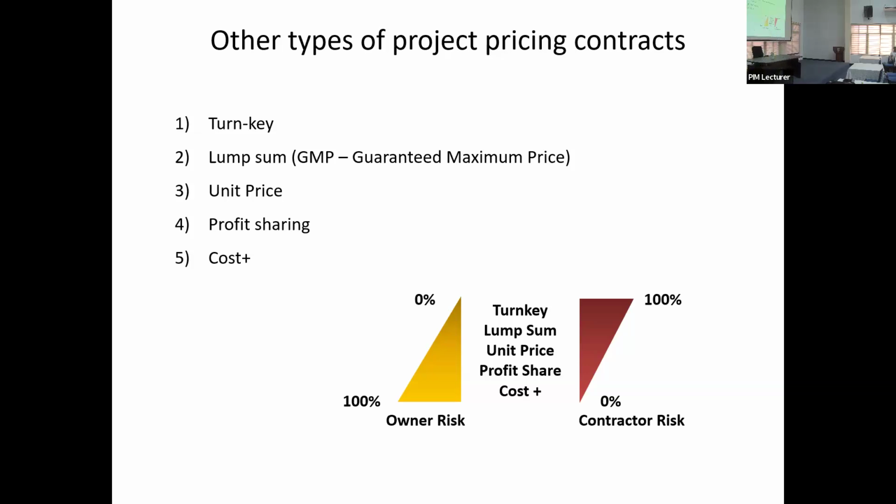So for example, there are 5 types of price here. There are a lot more, but I've just put 5 here. Turnkey. Now, turnkey pricing means flat, fixed. Most of the Middle East projects are fixed. American companies come, or a Chinese company, and say, don't worry, this is a fixed price, $100 million, I'll finish it for you. Fixed cost. They are also happy because they don't have to spend any more money. So no matter what happens, you have to finish the project for 100 million. Now, if the project goes to 110 million, whose loss is that? Not the owner's. I'm the contractor. I have to bear that 10 million extra.